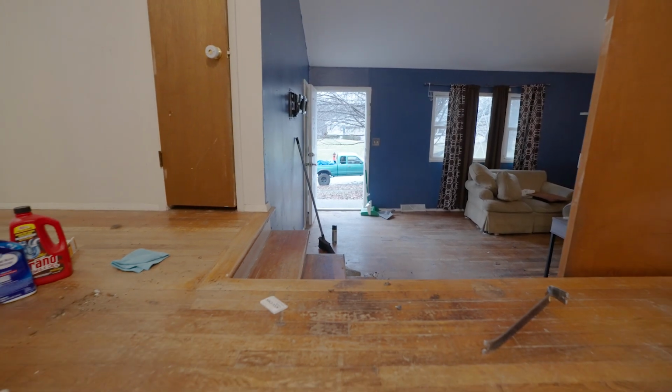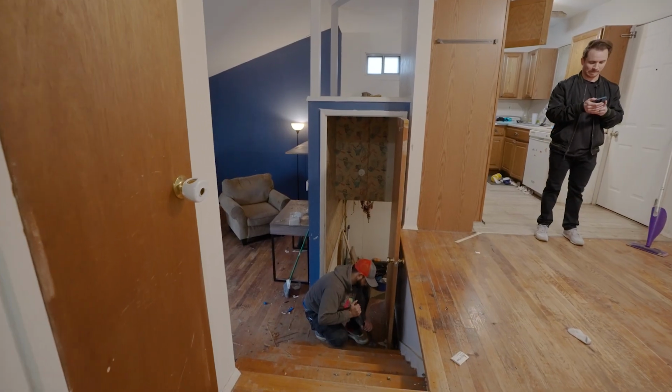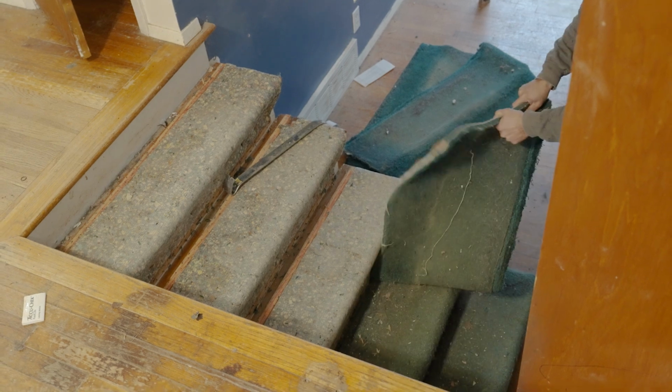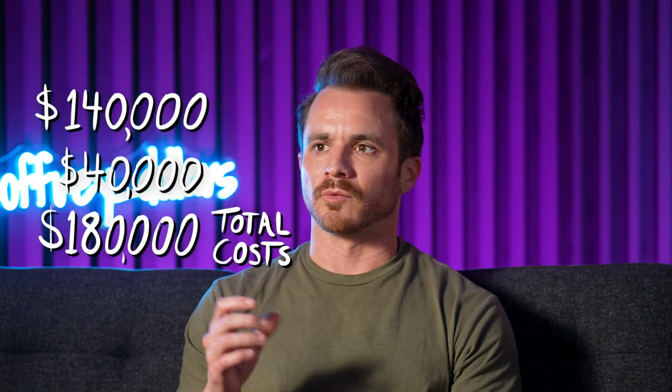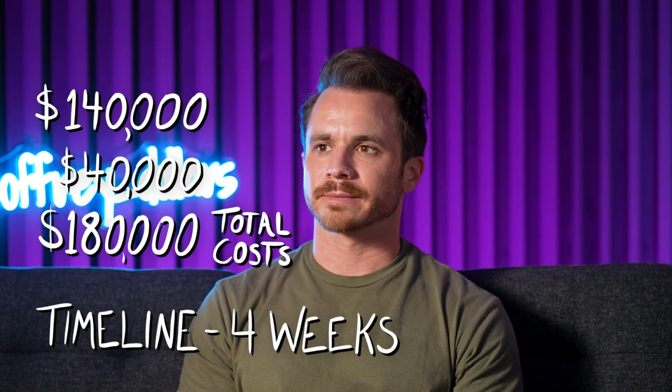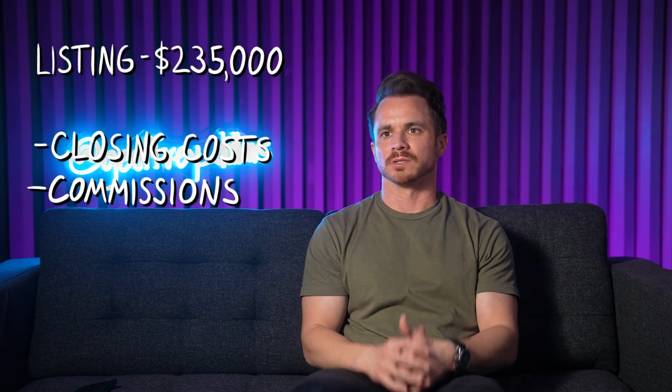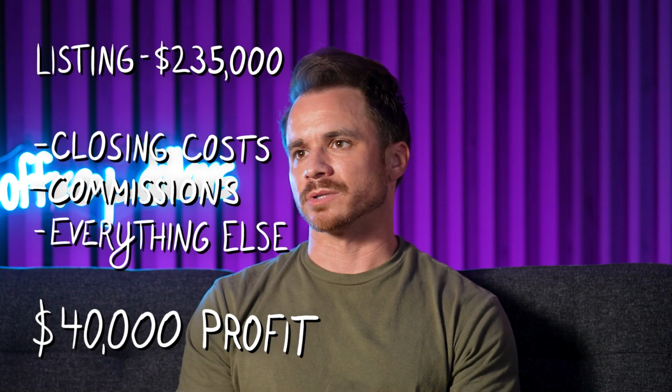Okay, so that's the house. We finally got the entire scope pretty much ironed out. It's not gonna be without its challenges, but the benefits are that we bought right, and there's really not a ton of work to be done. So we purchased the house for $140,000. We spent $40,000 worth of budget because it wasn't a huge renovation, and we had a renovation timeline of about 4 weeks. We had planned to list the house at $235,000. So after closing costs and commissions and everything, we make a quick $40,000 on this house.